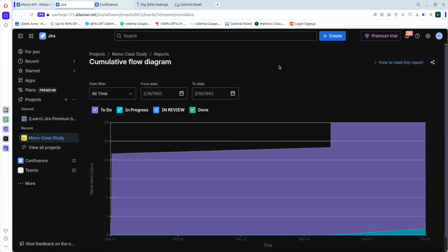And sometimes it could be that it has been reviewed, but the suggestions that have been created here have not been sorted. So let's say we've reviewed it and then there were some adjustments that need to be done in those areas. Sometimes review usually takes more time than even the task itself. Because you realize after reviewing, you submit again, then there's another review, you submit again, then there's another review, then it will get stuck. Then we now have so many reviews at that angle. So in cases like that, we could use the cumulative flow diagram to identify it.